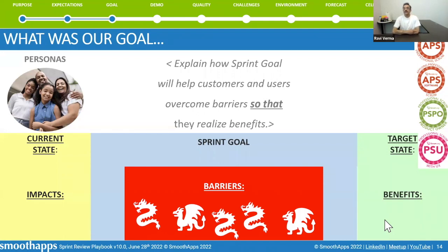What's going on? Actually, I've tried one of the techniques, recording the sprint review, and exactly this is what we have done as well in the past. And making sure that everybody on the call in the sprint review or in person agrees that they don't have any problem. Then we make sure that the relevant stakeholders have it available, and we create more of an invitation-based approach. That means, how can we create that curiosity and value for the stakeholders? If stakeholders are not coming, they are perhaps not seeing the value. How can we make sure that they start seeing value? And as Ravi said, your sprint retrospectives are the levers to really uncover those opportunities.